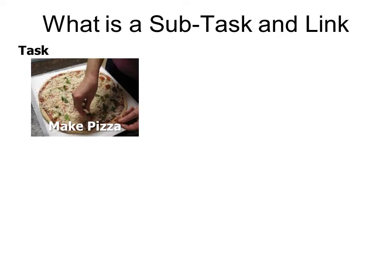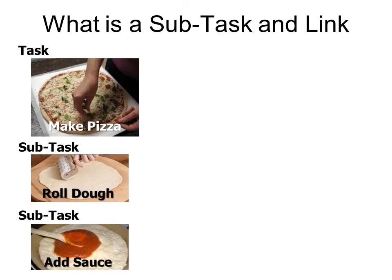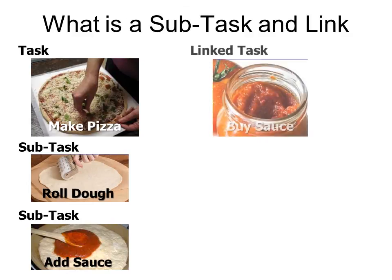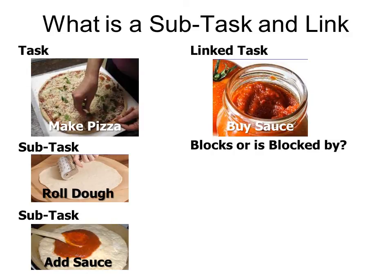What is a subtask and a link? And I like this explanation. A task is like making pizza. However, before you can make pizza, you're going to have a subtask of rolling out the dough and a subtask of adding sauce. But another task might be to buy the sauce. And that is not part of the make pizza task. It is a linked task. But the question is, does it block or is it blocked by the make pizza task?